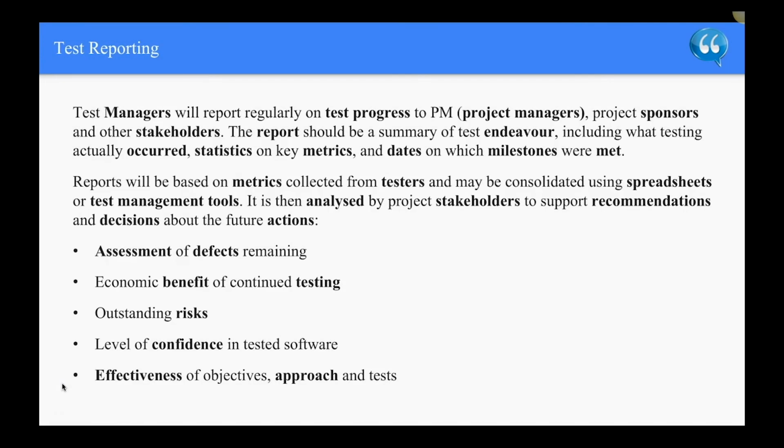Test reporting. Test managers will report regularly on the test progress to project managers, project sponsors, and other stakeholders. The report should be a summary of the test endeavor, including what testing actually occurred, statistics on key metrics, and the dates on which milestones were met.